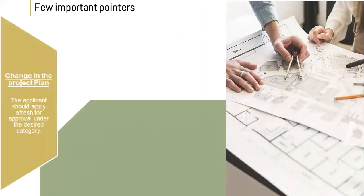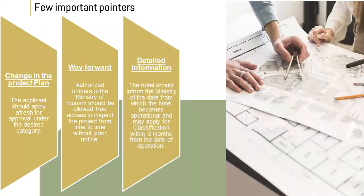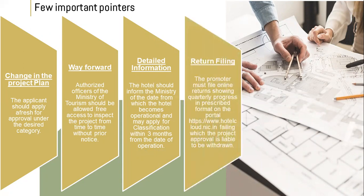A few more important points: for any change in the project plan, the applicant should apply for fresh approval under the desired category. Authorized officers of the Ministry of Tourism should be allowed free access to inspect the project from time to time without prior notice. The hotel should inform the Ministry of the date from which it becomes operational and may apply for classification within three months from the date of operation. The promoter must file online returns showing quarterly progress in the prescribed format on the portal, failing which the project approval is liable to be withdrawn. Remember, return filing is very, very important.